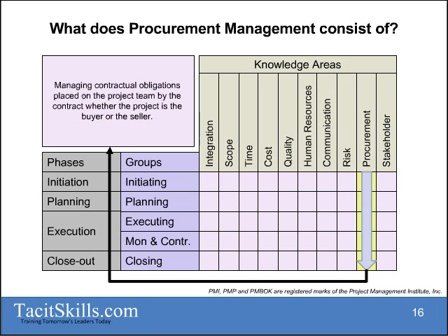Procurement, for all of those activities or processes that we are not going to be able to, or do not want to, answer from within our project, we will have to make a decision. Are we going to buy it from outside if we don't make it ourselves? So we'll have a make or buy decision, and that's where procurement falls in. That is to regulate all the contractual obligations for the part of the project that we're going to source from outside, whether it is material or skills or equipment, but those that we procure from outside.